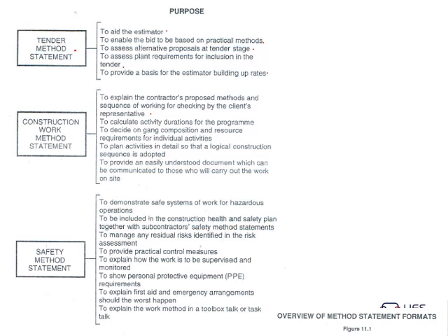Basically, for instance, now the engineer needs to know how you're actually going to pour this concrete. For instance, Amelia, where we did the pour there, it was a 24-hour pour. So we had to have contingencies. For instance, if the concrete stopped, where are we going to stop the concrete cold joints? Because it has a big influence if you stop. You can't stop at certain points in a slab like that, because the structural integrity of a slab like that is compromised if you've got a joint or cold joint at a certain place.